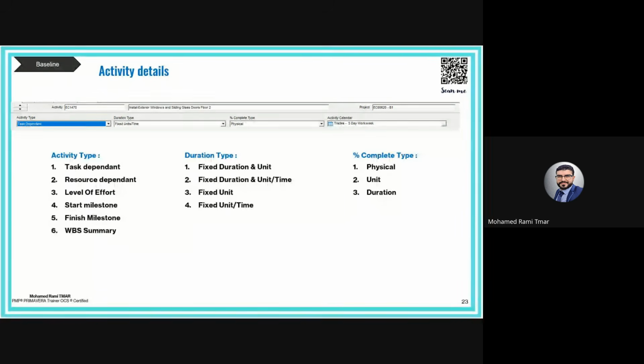Okay, and this is the real example. Like, for example, project manager, project controls, supervising team. We cannot assign them directly on the level of activities, but we assign them in this envelope or high level activity to manage their budget. Okay.